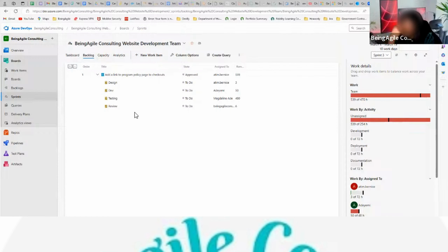That's another option. And then the third trade-off option, let's say, okay, looking at what we have in here, it's really not that big of a deal if we don't finish a specific item in this particular sprint. And now we've overcommitted. They can come in here and then look for a work item, a big work item. They pull it back into the sprint and then they can pick a smaller one that will not take so much time and bring it into the sprint. Those are the three common trade-off options that are available.